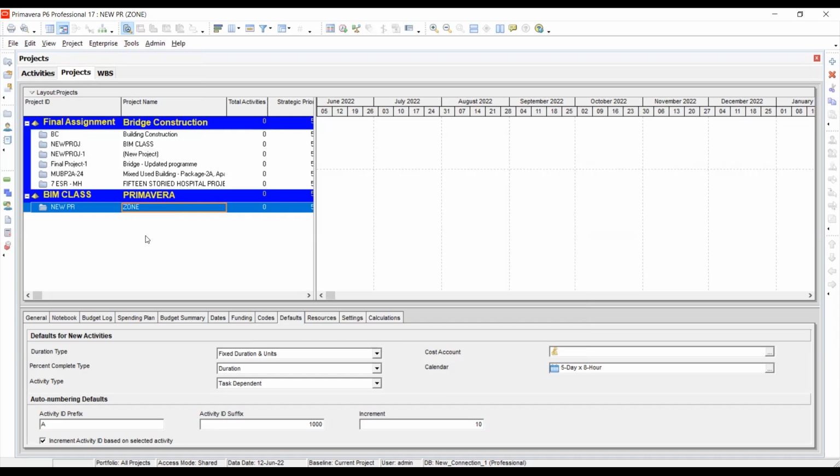So later, the main thing is the calendar. In MS Project last time we did the calendar. What is the importance of the calendar? Prepare and set the calendar before starting a project. Because in Primavera the difficult thing is, if you have failed to do any basic changes in the basic stages, it is very difficult to correct those things after that. Otherwise it is very difficult to adjust.